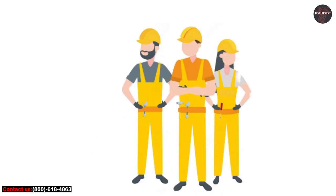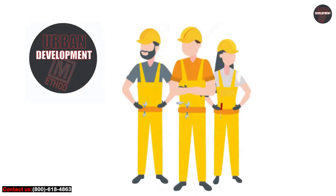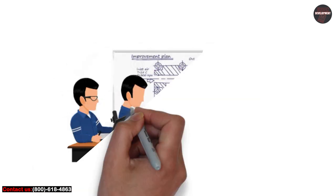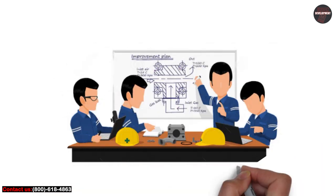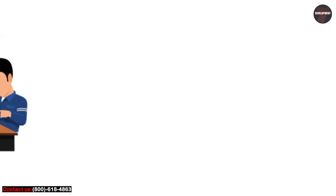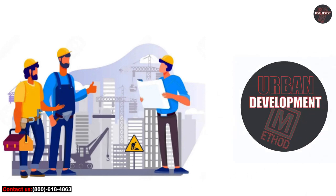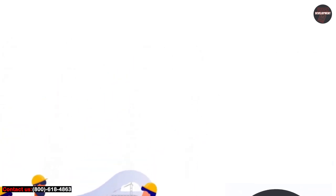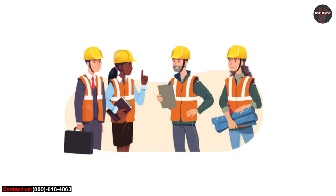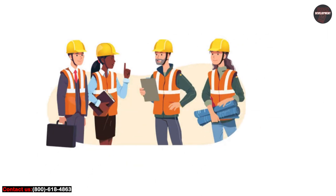Building innovation into projects from the start. By contrast, design-build brings expert construction and trade professionals, who will ultimately be tasked with executing the designs into the process from the start. These professionals aid the design team by evaluating designs for cost, schedule, constructability, and sustainability at the onset of a project.